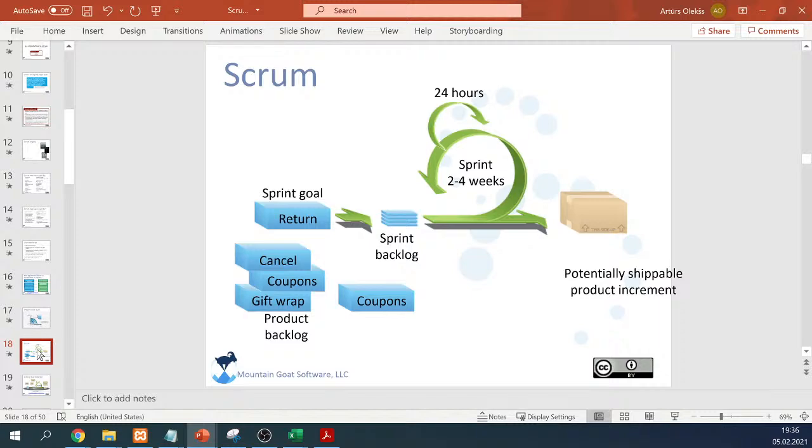We actually plan, and we start our sprint with the items. Not all the items from the backlog are in each sprint, but we split them, and at each sprint we work with the items that belong to the corresponding sprint defined during the planning.